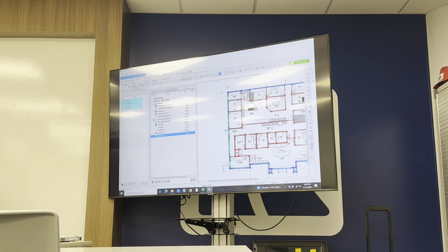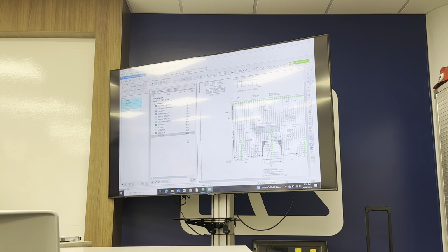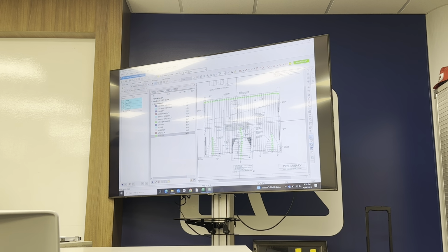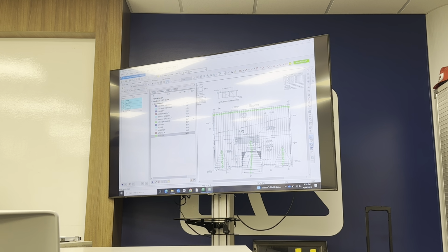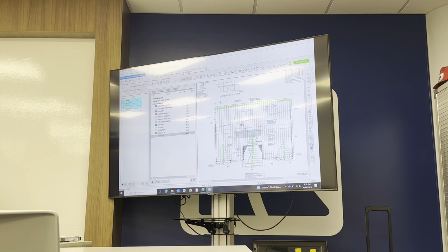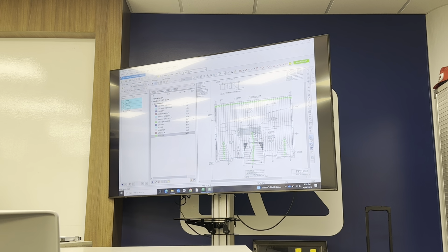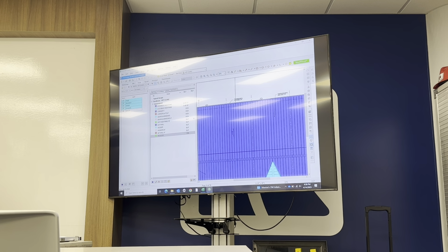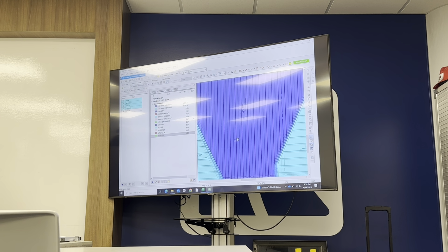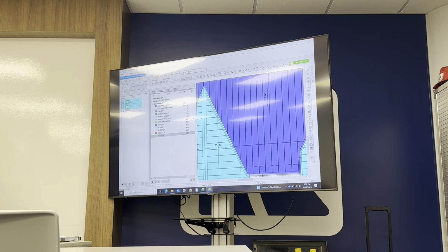Trusses are shown on a different page, but pick up your trusses. They'll show up on my 39th sheet. I use the roof plan to take off my roof sheathing because you need to use the slope factor. So, you understand how slope works, and the importance when you're taking off from plan view.